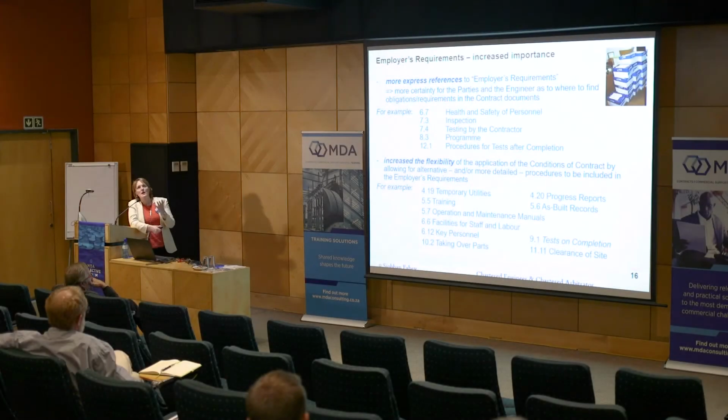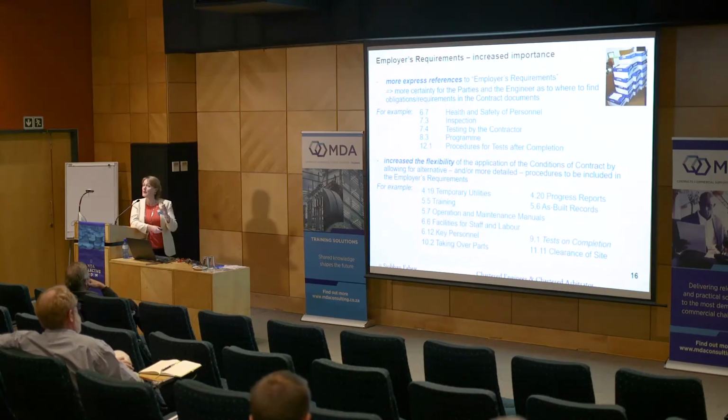But we also, under the 1999 forms of contract, you'll see that there's quite a lot of provisions that have the wording of unless otherwise stated in the contract. Yeah? And the question quite a lot of the time arises, where in the contract? Because if you remember, Bahati was pointing out the priority of documents. Is it in the specification? Is it going to be on the drawings? Is it coming from information from the employer? Or is it to be found in the contractor's proposal, in the contractor's tender? Is it in the pricing document? Where should we go to look to find it?